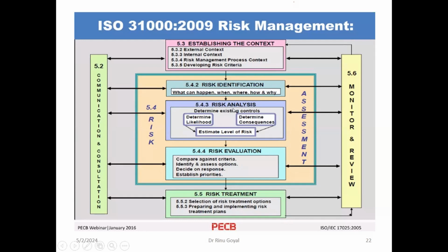So what we have done is identification and estimation. These two put together are called risk analysis. When we give it a likelihood number and a consequence number and estimate the level, it is called risk analysis. Once we have identified and analyzed, now we have to check how valuable it is to go further. So we have to evaluate against the existing criteria, decide on response and establish the priorities. Once we have given an exact number to a particular activity, then only we can prioritize which action is to be taken first and which later. So this whole exercise, identification, analysis and evaluation, comprises risk assessment.